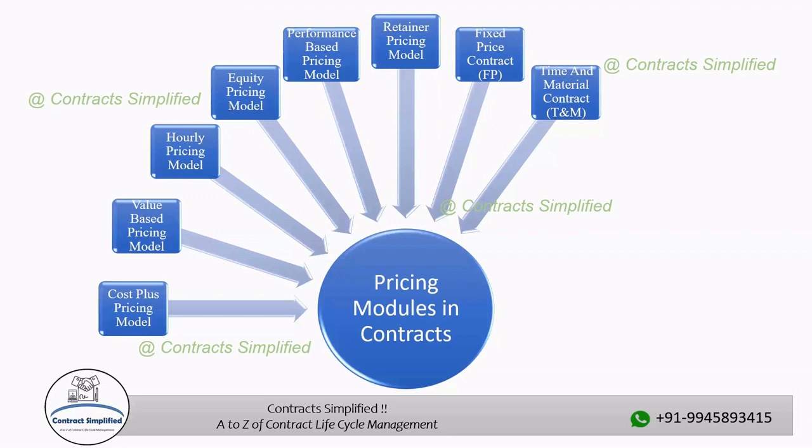The contract specifies the hourly or daily rates for labor time, and the cost of the material that will be reimbursed by the client. The contractor is required to keep track of the hours spent by their employees or subcontractors on the project. These hours are usually documented with timesheets or other similar records. The contractor is reimbursed for the cost of material, supplies, and other projected expenses such as travel expenses that are directly attributed to the project.